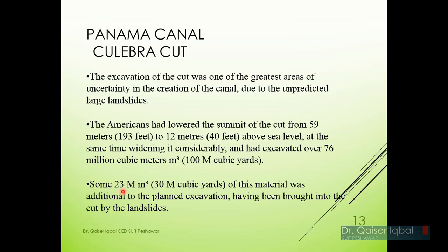But because of the landslides, they lost a lot of men and a lot of equipment as well. When they were excavating extra material, it was failing because they did not understand slope stability, which is later presented in soil mechanics. The debris was falling, killing people and damaging the equipment. It also resulted in 30 million cubic yards of additional soil to be removed, because of the material coming down from the landslides.